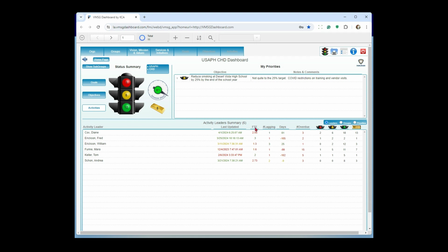When you're assigning the people as activity leads and activity team members, you can also assign that FTE value, the 0 to 1. So how much of this person's time is dedicated to this activity during the time period of the activity, so between the beginning date and the ending date. And what it does then is roll that up across all the activities out there by person. So what you're seeing here is that you would have Fred at a 0.3 FTE, which is way, way underloaded. You've got William at a 1.3 FTE, which is a little bit overloaded in here. Then you got some of these folks, way out of bounds. In an ideal world, you want to try to limit that to a kind of a 1.0 FTE.